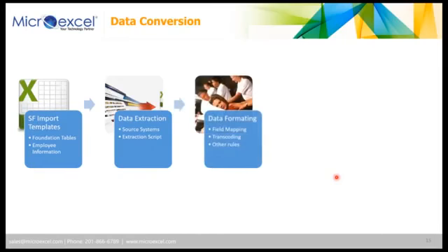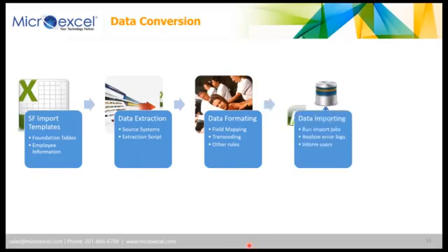So you need really to save your queries or your scripts to be able to rerun them at different times. Then basically there is of course the whole data formatting, or we call it data massaging, and that's really where you're going to have to map the fields, transcode them, create some rules to basically fit into the SuccessFactors part. So again, it's something that either we do for you or you have to do it directly in the SuccessFactors template, and that's what's going to make the difference between an implementation where you leave it to your HR people to do it, or you want to have your service delivery or your partner to do it.